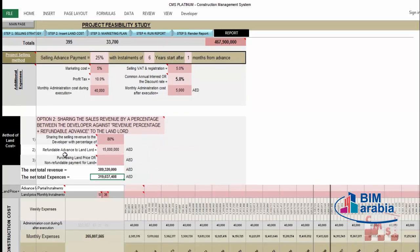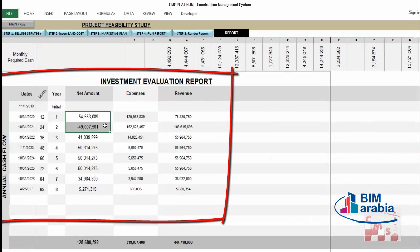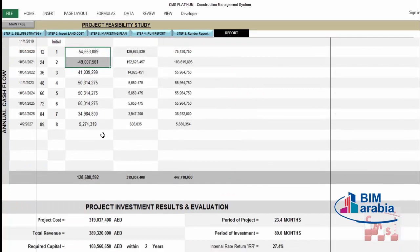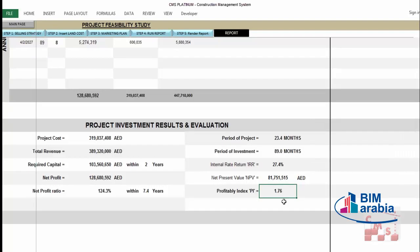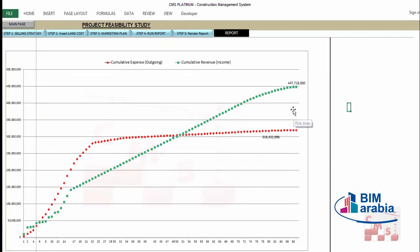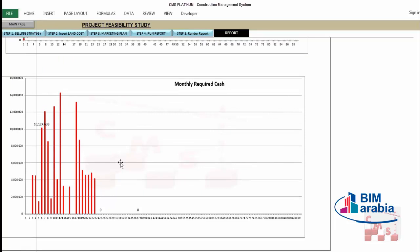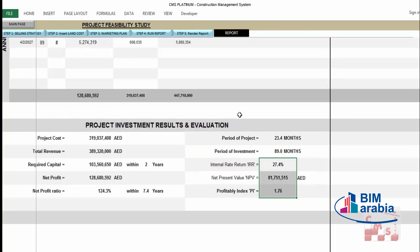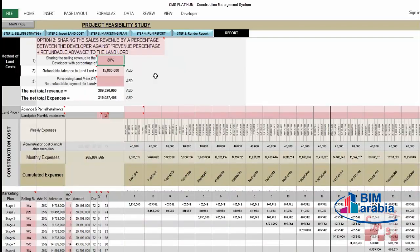Let's look at the other landlord options. Option 2: sharing sales revenue by percentage plus a refundable advance to the landlord. The landlord asks for a percentage of total selling revenue plus a refundable advance — an amount paid now, deducted from his share after selling. For example, agreeing on 80% for the developer with a 15 million refundable advance, you see your net revenue and total expenses in the report, including the negative cash flow over the first two years, IRR, NPV, and profitability index.